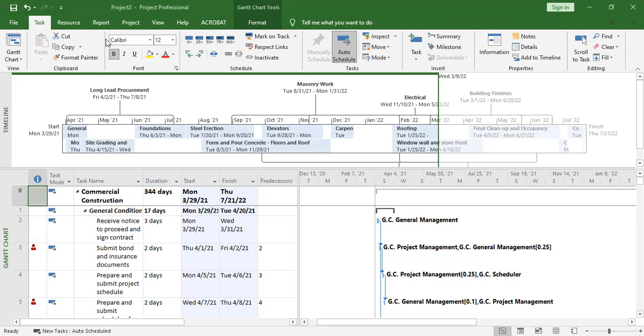Okay, like in normal scenarios, if you never jumped any step, you're supposed to first finish the schedule before the project starts. Set it as a baseline. Now, if I start setting a baseline now, it's like I'm beginning now. Then I want to track now. So how will I do it if I set the baseline now? Then it means I can't track.